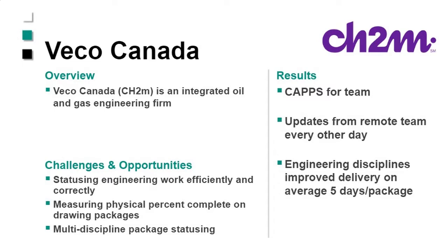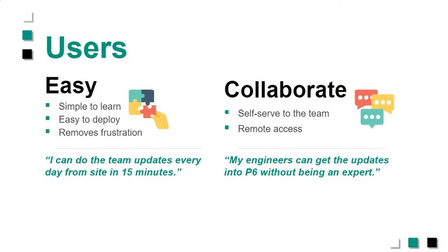Another client example is a large group in Australia doing a multi-building discipline rework package. The PMs are updating the schedules once a week, which is really helping them understand what's going on across the whole portfolio. Prior to that, they were doing updates once a month only. At the same time, they were doing cost updating, and often they were really struggling to hit their reporting deadlines for their client. So this was another good example of different usage.